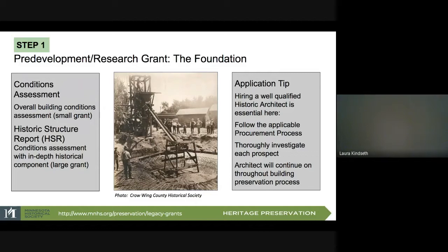When you have narrowed down your list of proposals, it's time to do the final evaluation by asking for examples of previous assessment projects, and they should be able to provide digital copies for you. Then follow up by doing individual interviews, whether by phone or in person. This is the best way to understand if they're really qualified and know what is needed for these projects.